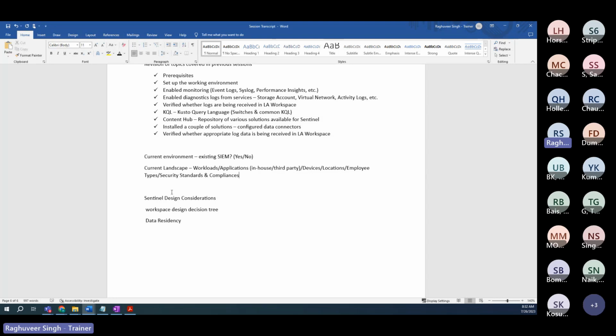So there will be stakeholders at both sides whose job is to identify the team, nominate the team members, ensure that the initial kickoff meeting happens across the sites, and then a project plan is shared, reviewed and approved by both sides. And then as per the project plan, the milestones are identified, schedules are identified, dates are identified.